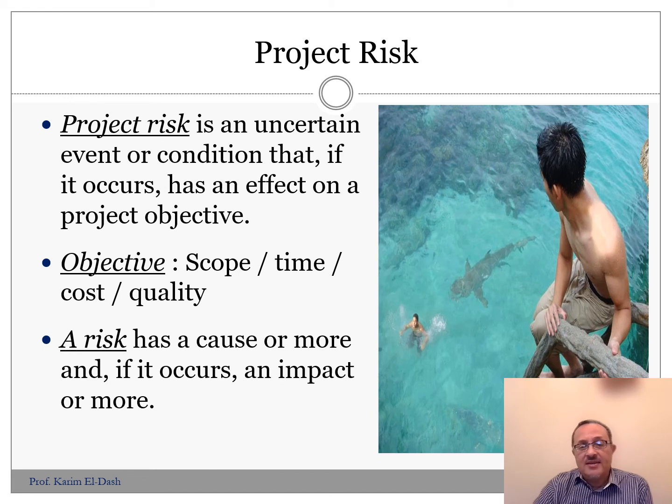Okay, how about the impact? The impact of the delay. The delay for sure has an impact on time, one of the objectives of the project. And usually it has an impact on the cost. As we mentioned, we might pay a fine. It is not a fine, but we have to pay a fine. Sometimes the delay may cause a change in the specs. That's an impact on the quality.